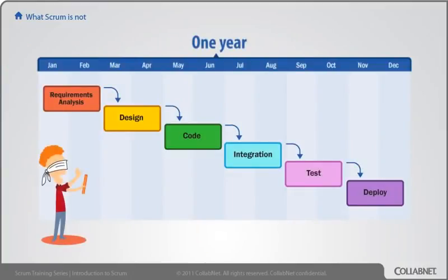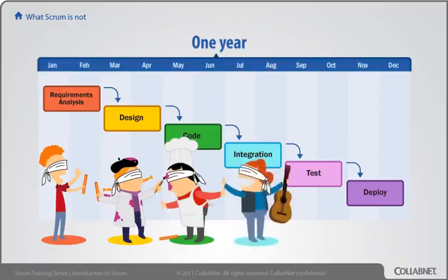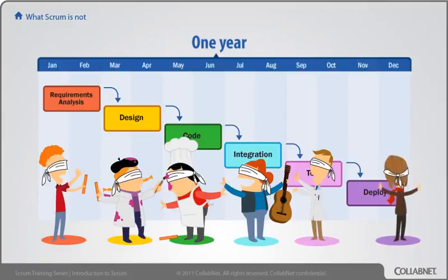The reason it fails for complex work, we rarely have perfect knowledge at the beginning. In fact, we know less about our project when we're starting out than we're ever going to know in the future. Today is the dumbest day of the rest of our project. But a plan-driven approach requires us to make our most important decisions right at the beginning when we know the least. Waterfall projects eventually descend into anarchy when the actual work finally happens with low quality and too much overtime.